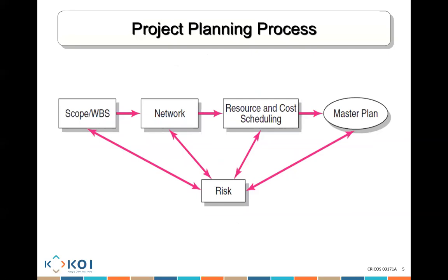For these sub-activities, we start assigning people to do them. The activities in a work breakdown structure are only a list. What we do then is create a network diagram. From this list, we decide what comes first and what comes after among all of the activities listed on the work breakdown structure.